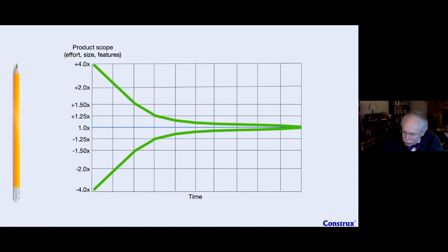Because remember, I said that we should be doing our little estimate game multiple times throughout the project. We should be doing estimates over and over again. And the go, no go question says, for this first estimate with the planning number, which is not super comfortable yet because there's so much uncertainty, because we know it could be anywhere in this area, is it worth doing enough work to get down here so this area really shrinks? That's what the go, no go is about. Is it worth investing in a short chunk to learn more? Because that promised number out here is going to be way too big for us to really like or live in. We'll want to try to drive that forward.